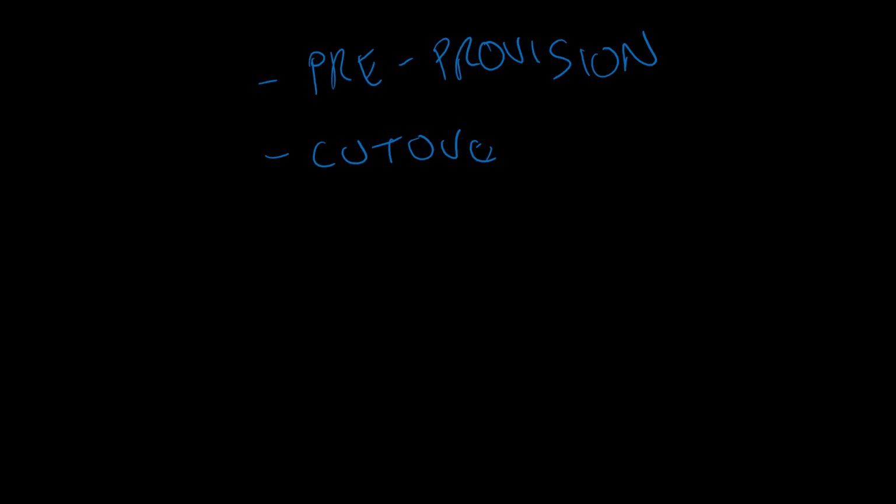The methodology that I always communicate to my students is pre-provision, cut over, decommission.